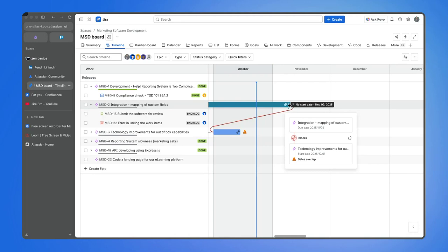For example, if we are building our e-learning platform, 90% of the websites on the web have two features, and those are the sign up and the sign in features. So you cannot have the sign in feature before you have the sign up feature. So that is the thing. We can do something like that.